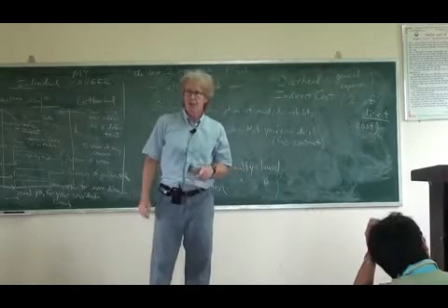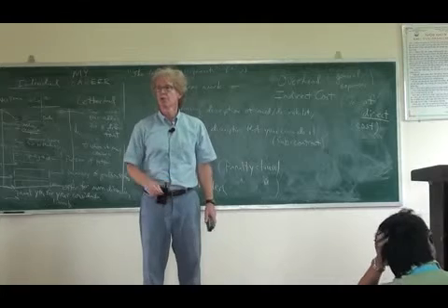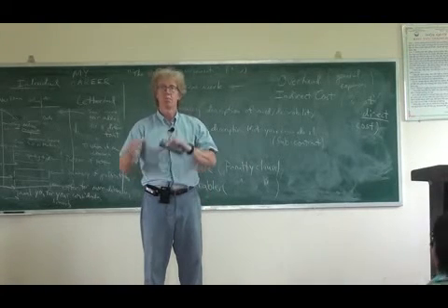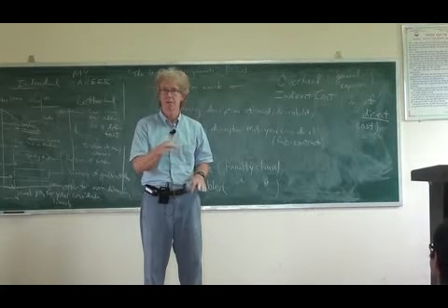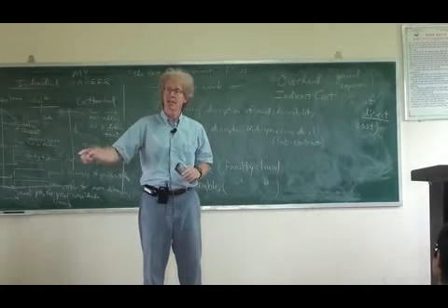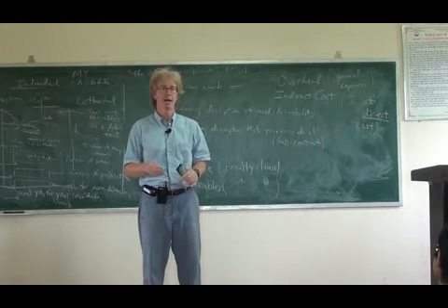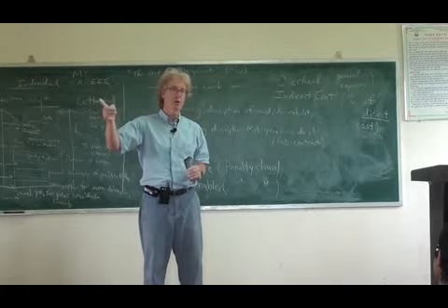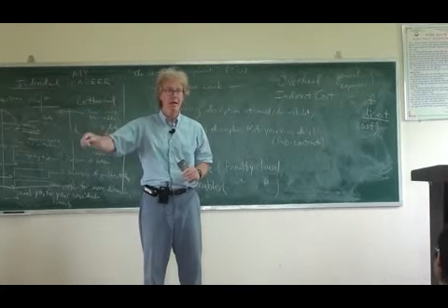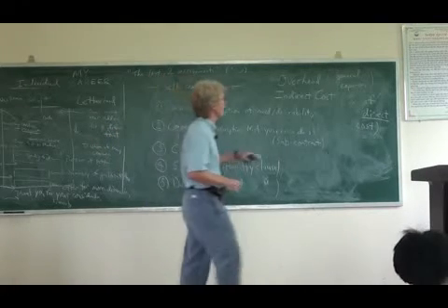And direct cost is the direct cost of doing that project. So your direct cost could be your salaries, could be some benefit that you have to pay on top of your salary, like health insurance or something like that. If you have to buy supplies to do this project, it would be supplies. If you have to travel, maybe you have to travel down to Ho Chi Minh City and meet some other experts down there. So that's a direct cost, part of this project. Right? All of those things are the direct costs.